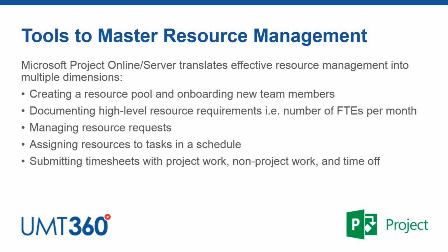So we talk about Microsoft Project as different tools or features available inside the platform that allow you to manage your resources more effectively. First of all, we want to make sure we have a central resource pool to which our projects are connected so we can leverage resources together and get a good look across all projects, across all work for all of the resources. Having the ability to document high-level resource requirements.